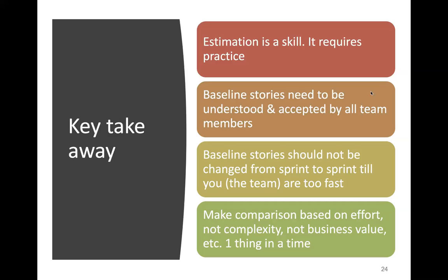We need to understand the baseline stories, which are accepted by the team members. If we don't understand the baseline stories, again we are going to fail, and we move toward providing story points relative to units like hours and days. The baseline story should not be changed from sprint to sprint until the team is mature enough.